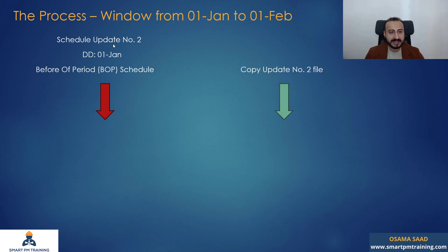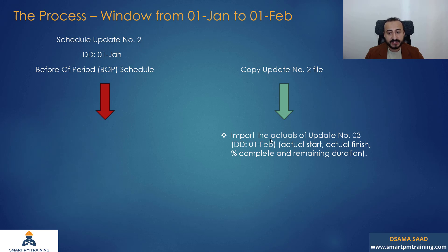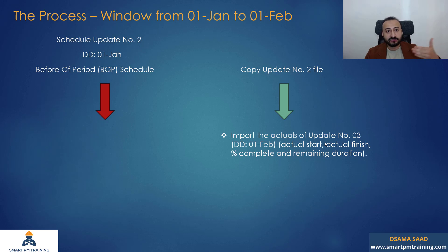We will copy schedule update number two file — I'm going to take a copy of the before-of-period schedule. Then I will import the actuals of schedule update number three: data date 1st of February. I will import the actual start, actual finish, percentage complete, and the remaining duration. So I'm going to go to schedule update number three, export the actuals, and import them into this file which is a copy of update number two.